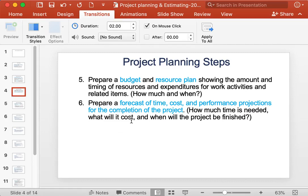Then we can prepare a forecast of time, cost, and performance projections for the completion of the project. From this we can answer questions like how much time is needed, what it will cost, and when the project will be finished.